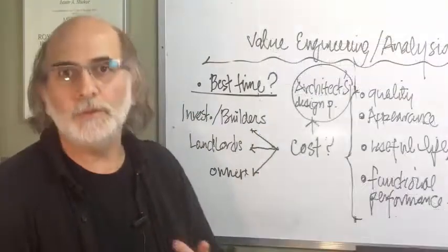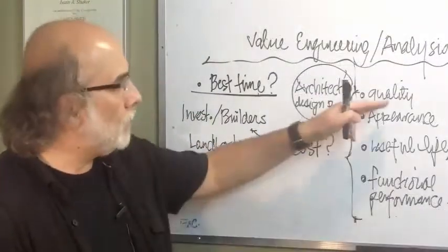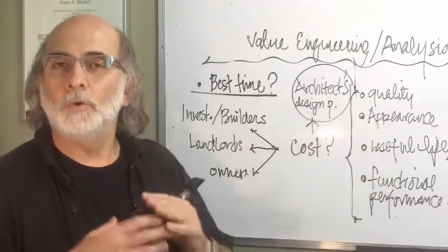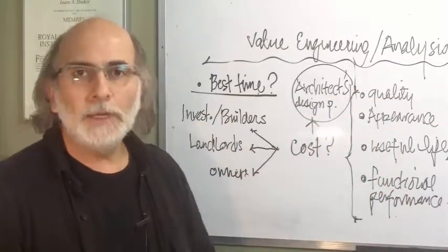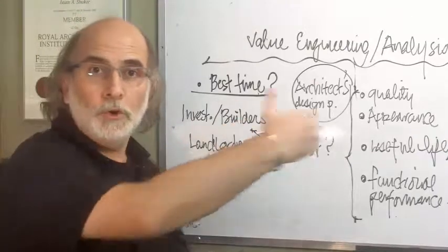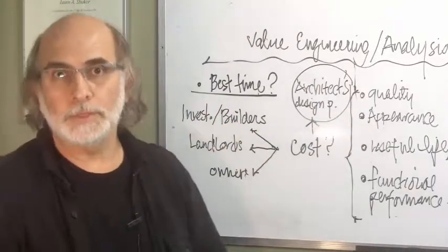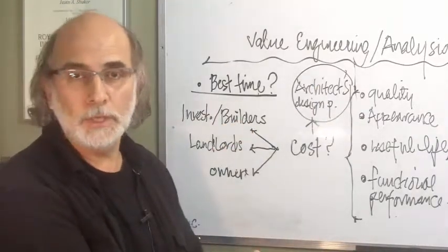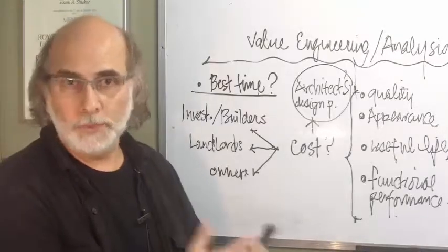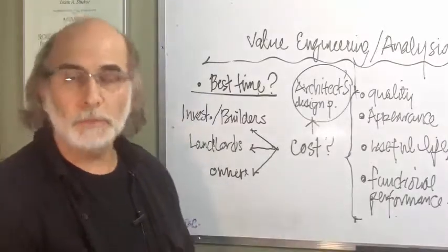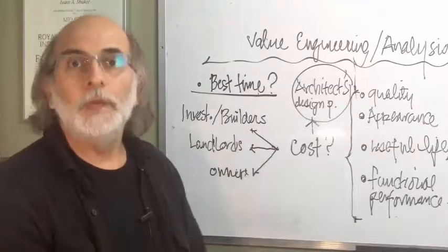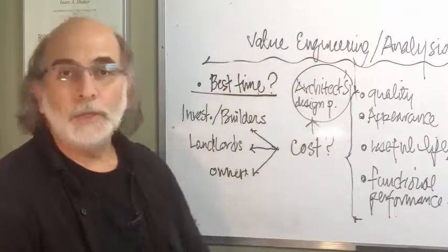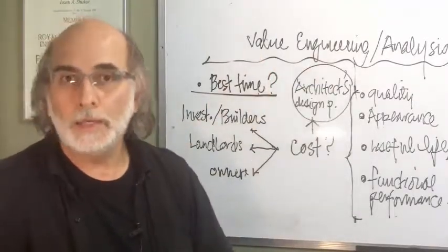So changing them, optimizing them in any of these qualities would be very easy, would be much less costly than when you reach all the way to the end of the process, almost at the building stage or pre-construction or at the permit level, and then you start to use value engineering, which would be highly costly.